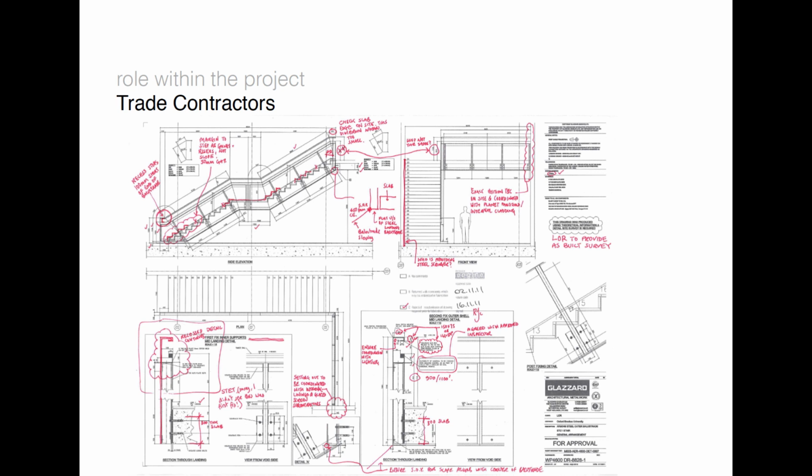And part of the benefit of being on site, being a site architect, is that you can quite often shortcut some of this program by talking to people face to face and sitting down with their drawing and our drawing and going through exactly what the issues are. And so that next time they submit it, they get it spot on, and we kind of know what's coming.